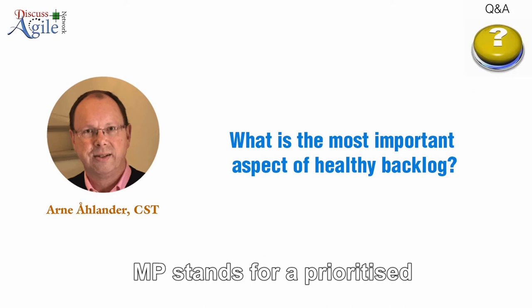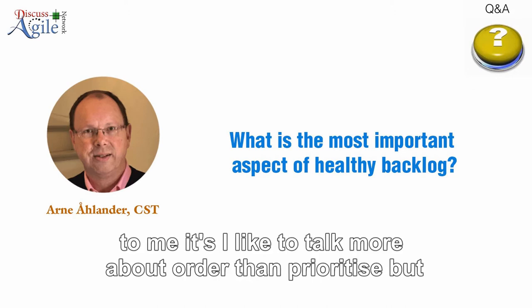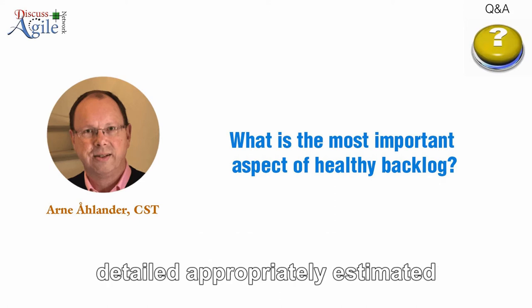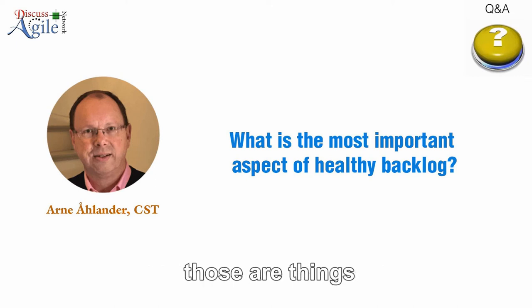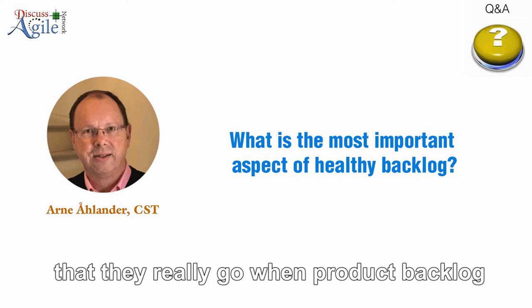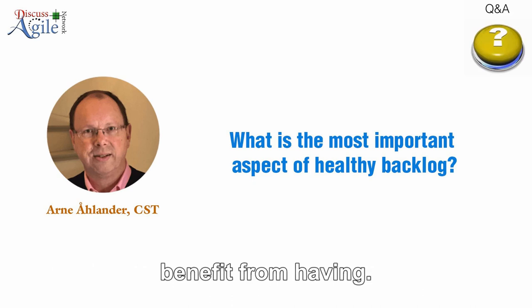And P stands for prioritized. To me, I like to talk more about order than prioritized. But detailed appropriately, estimated, emergent, and prioritized — those are things that a really good product backlog benefits from having.